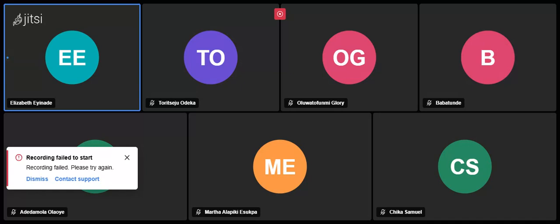What can my engineers consume in 2 weeks? What are they able to do in that 2 weeks? So it can be just, okay, sign up and log in. So you put it in your sprint. So that's your sprint one. And when you are done with your sprint one, you end your sprint, you end with your sprint retrospective, then you start again with planning, then you go back to your backlog.